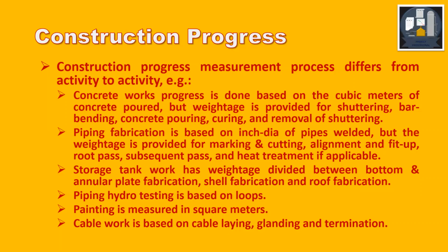Piping hydrotest is based on the loops. Then painting is measured in square meters. Cable based work is based on cable laying, glanding, and termination.